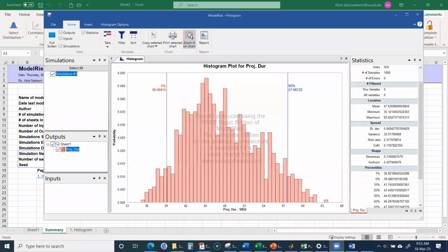Then there is a chance that the activity will finish early. So the triangular distribution provides us that kind of bias in that situation. Whereas when we take the normal distribution, then we are negating that bias. Negating will show that there is an equal chance of the activity being delayed and the same chance that the activity can finish early. So that's why we don't use the normal distribution for the activity times, okay?